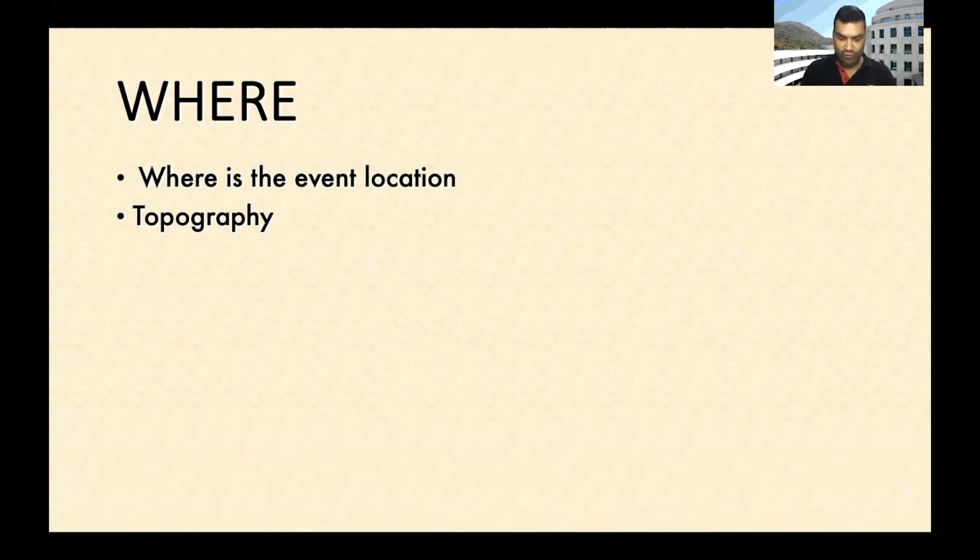If it requires you to send someone physically to go see, take pictures, measure the venue, and come back with a feasible plan, and then go to the client and say, I have seen the venue, I have understood the dimensions, I have understood the logistic issues, I have understood the topography, I have understood what are the challenges of getting into the venue with people, with technology, with infrastructure and your guests. And therefore, we can only fit in so many number of people into the venue. This becomes an essential of where is the venue.